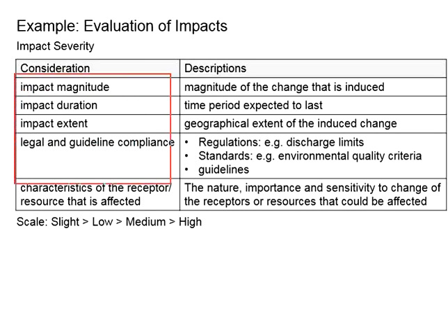These are some of the possible considerations: the magnitude of the impacts, the duration of the impact, the extent of the impact, legal and guideline compliance, and the characteristic of the receptor or resources that is affected.